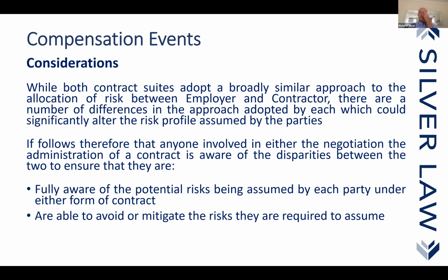Yeah, I think what that person is saying is effectively correct. Yes. What we've got to recognise is that what is being paid in interim applications is different to what is ultimately being paid, let's use the terminology, within the final account. Where you've got targets, the contractor is paid what they've actually incurred, their actual cost, their defined cost, and then the total of the prices, the actual end value, is assessed at completion.